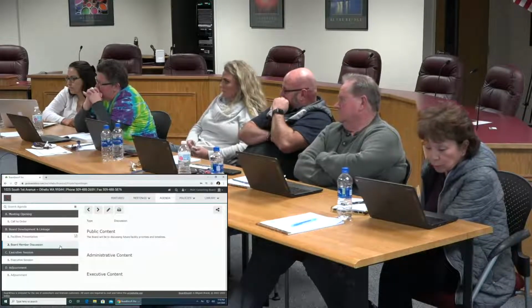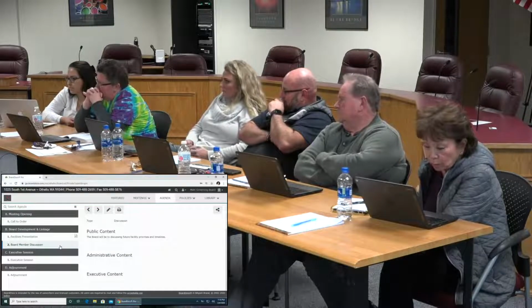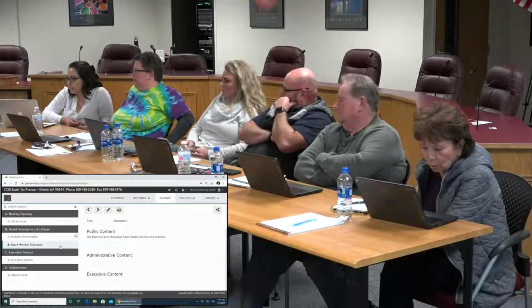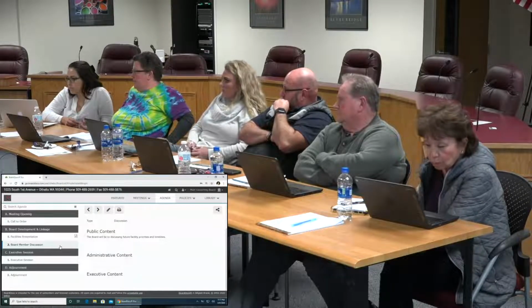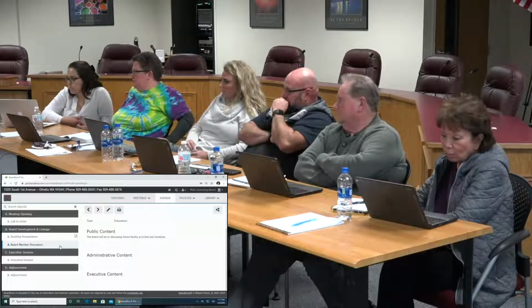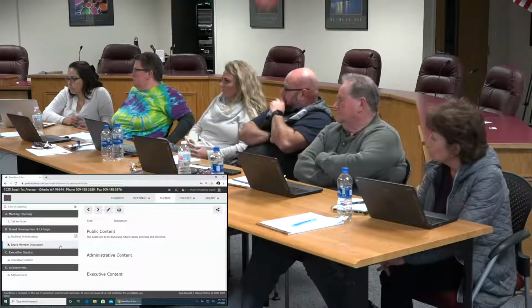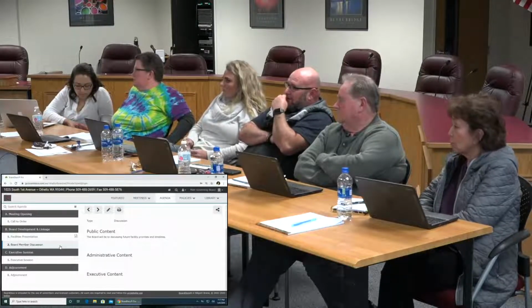if you just said, hey, we're gonna spend 50 million, you do a backwards budget, you do the high school, you maximize your state match, and then when you move to the elementary, you're gonna build the core space for a 65 to 70,000 square foot facility, and then you modulate back to what you can afford within the 50 million. So if it's 50, 55, it's pretty easy to develop alternates where you can expand and contract that facility within the dollars you have available.